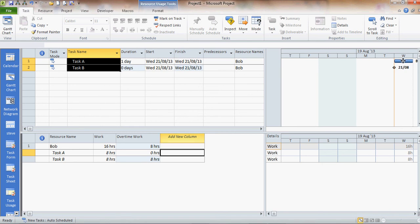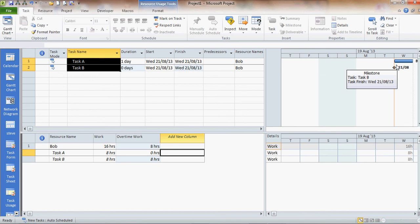And on the Gantt chart you can see how it's rationalized that. Task B has gone to a milestone so that it can actually be shown as going on in the same time period. And that's how you do overtime.